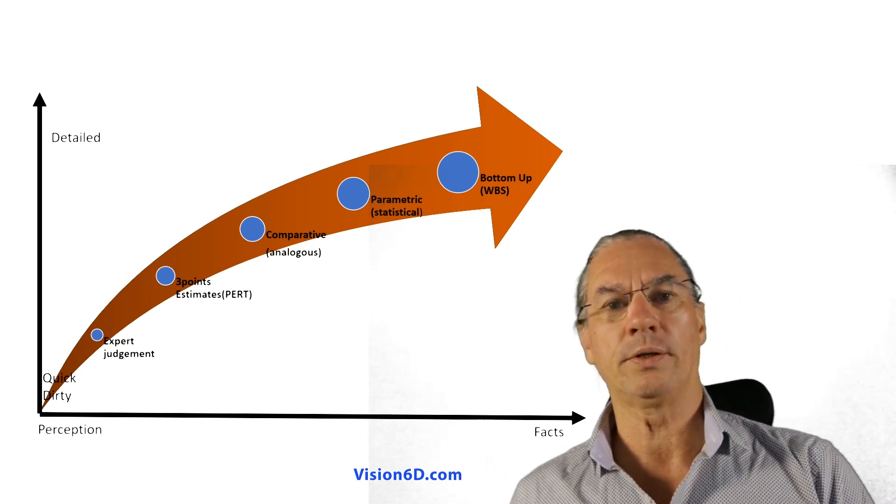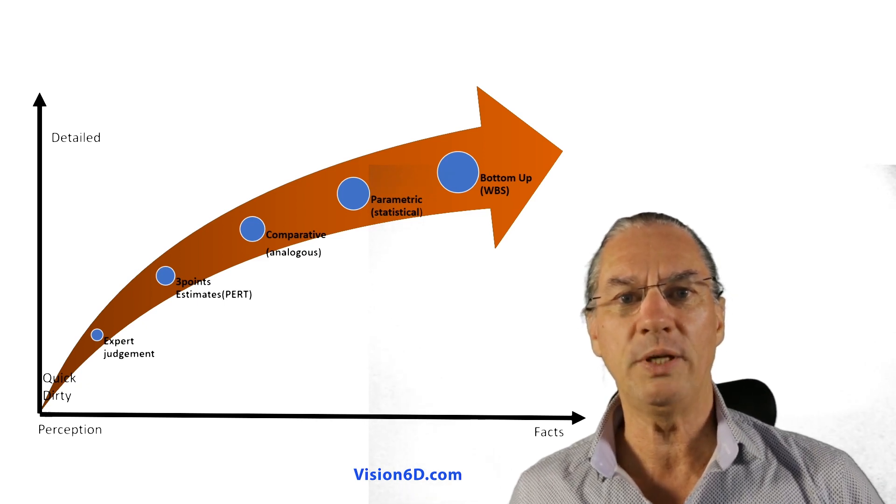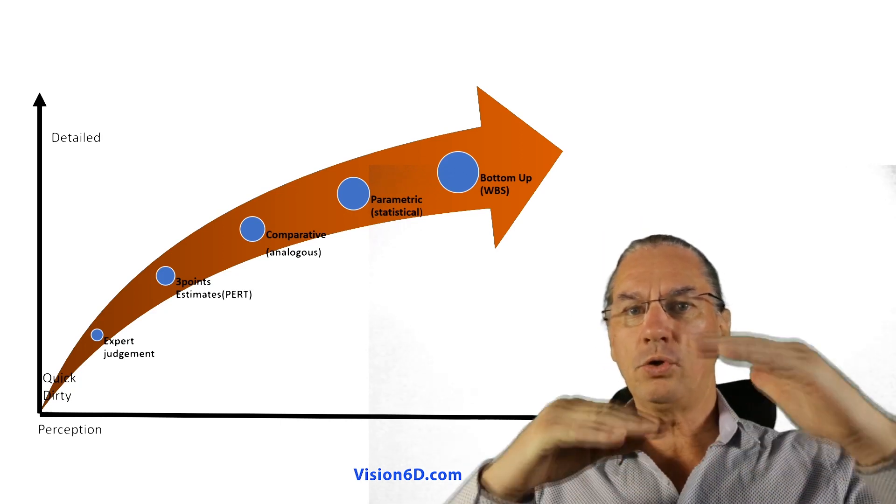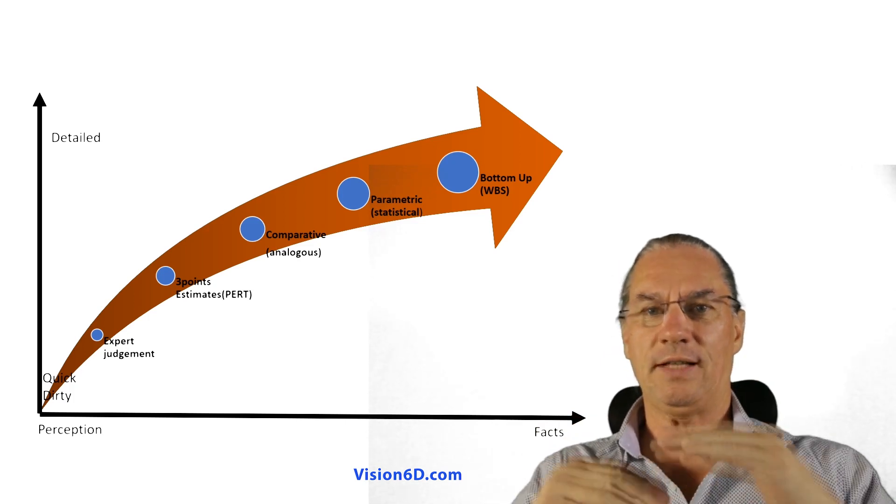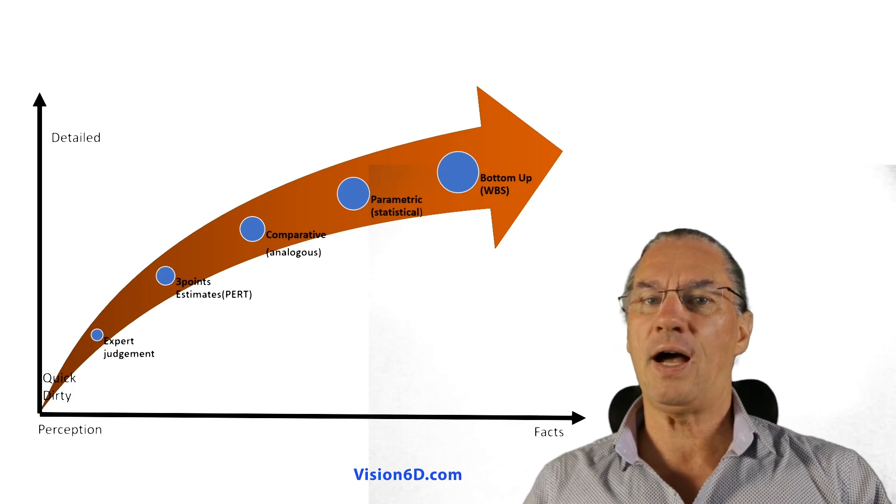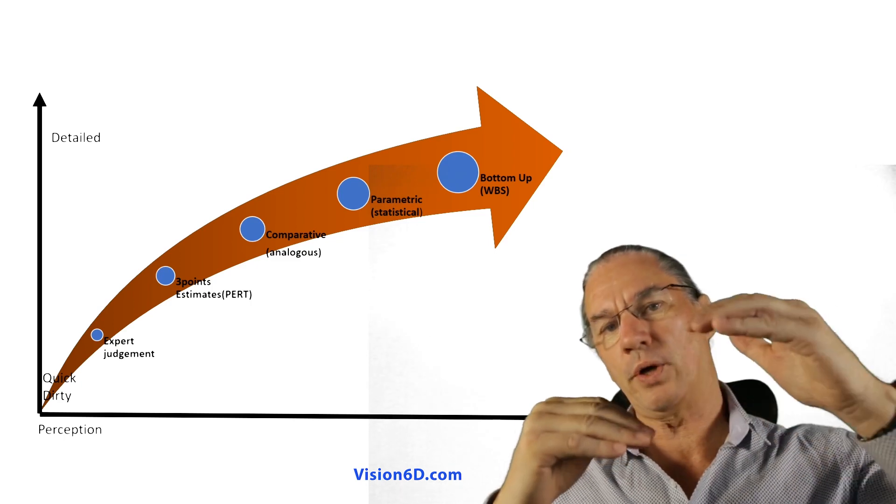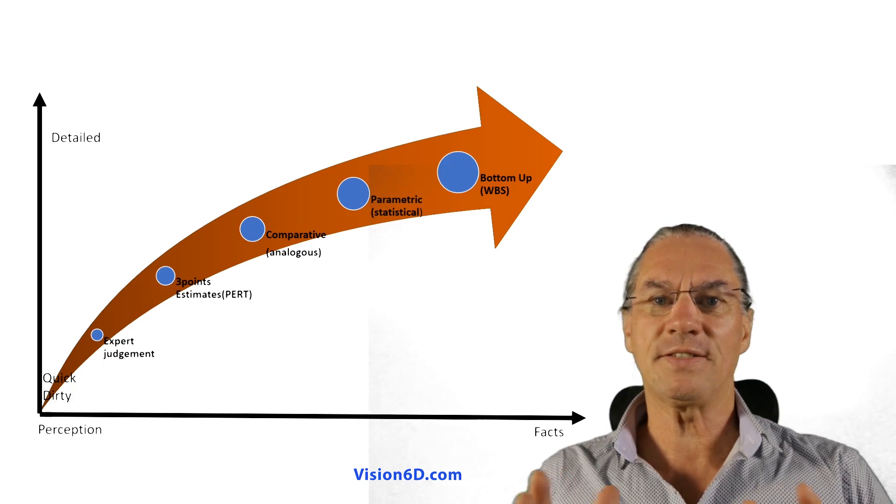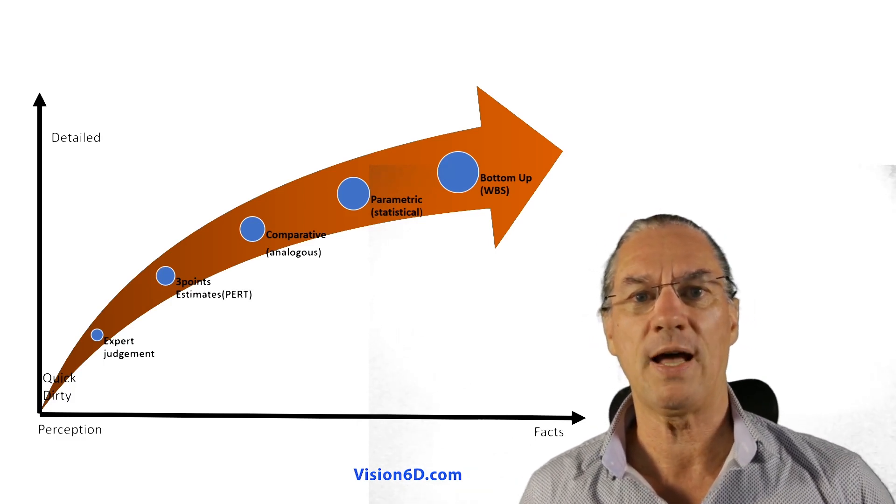The last one, which is the one called bottom up, in which we use WBS, the work breakdown structure. So we are going to break all the work elements in little chunks that we are able to really say, okay, this I know, I need so many hours to do it. And all those chunks, we are going to sum them up. And in the end, you have the estimation of the complete project as well in time as in cost.